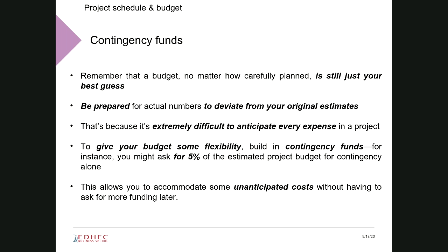Okay. What is it that we call a contingency fund? You naturally know that over the period of the project, you might face bad surprises, or maybe in your initial plan you overlooked some costs, or you forgot about some costs. That is why usually we have to plan for a kind of safety margin when we plan costs, and this is called the contingency fund. And this is about 5% of the estimated project budget that is planned and usually accepted by finance departments.